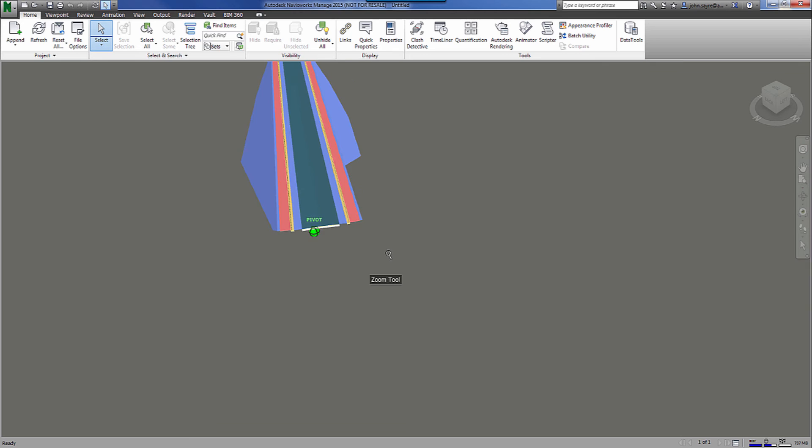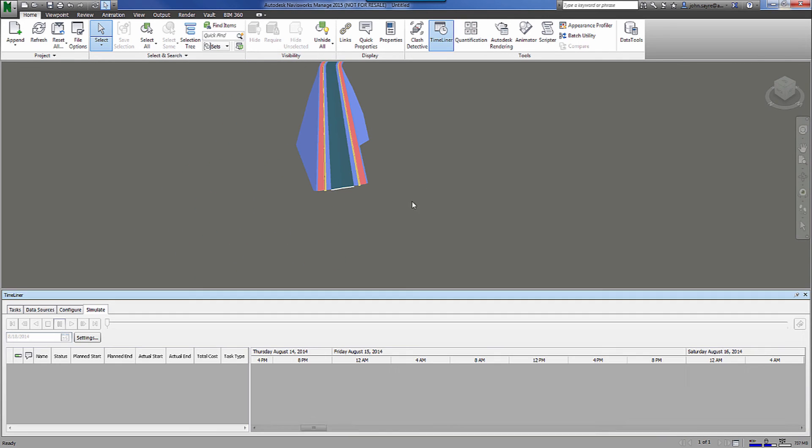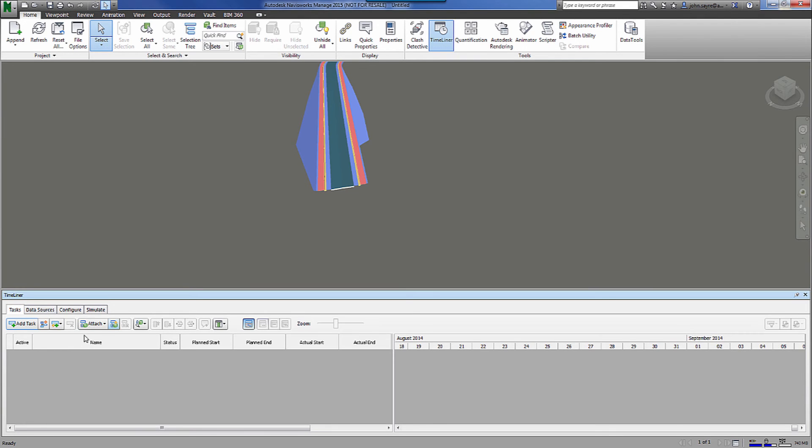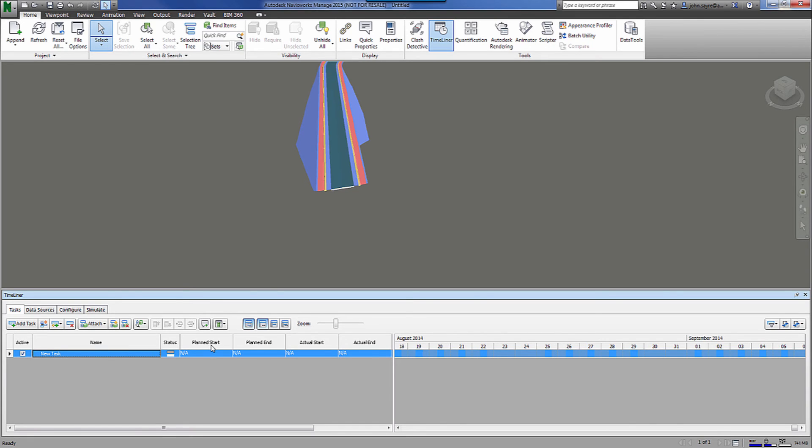So I'm going to go ahead and open up my Timeliner. First things first, we're going to select the Tasks tab and we can add tasks manually if we want to. We can hit add a task. We can give it a quick name, a planned start, a planned end or an actual start, an actual end date if we have those. But we just have to manually fill this information out. As you can see, it would take a little while to add those manually. It could be done but it does take a little bit.